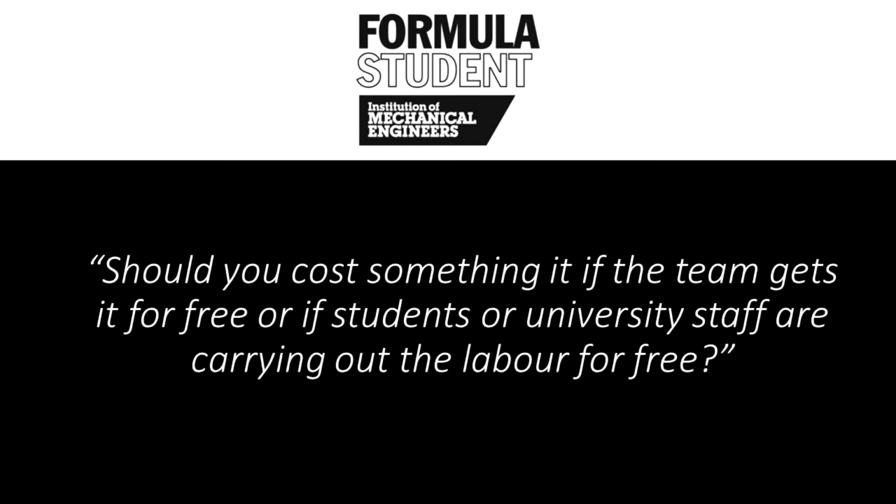Should you cost something if the team gets it for free, or if students or university staff are carrying out the labour for free? Yes, is the simple answer to that. We're trying to get an overview of the cost of the car that's presented in front of us. We recognise that student labour is cheap labour because we're not outsourcing it. But it's still labour, and it's still a resource that we would have to account for in the real world. So we want to account for that in cost of manufacturing for the student world.